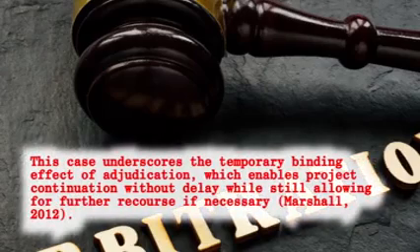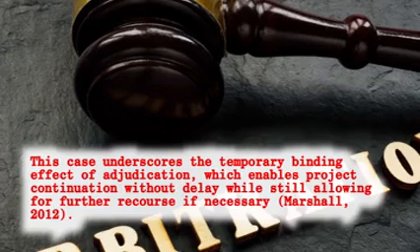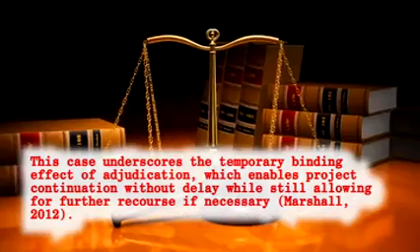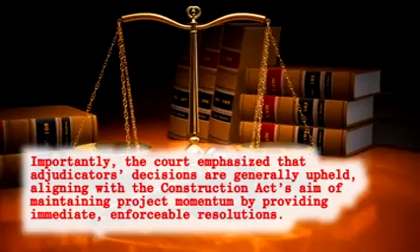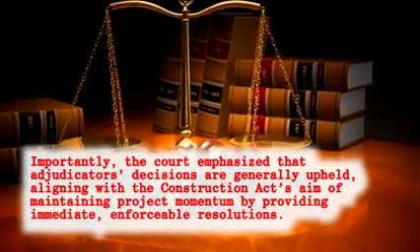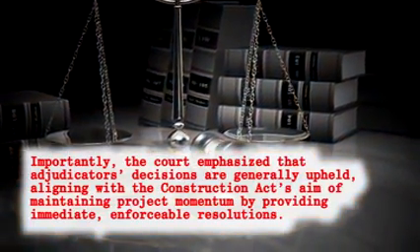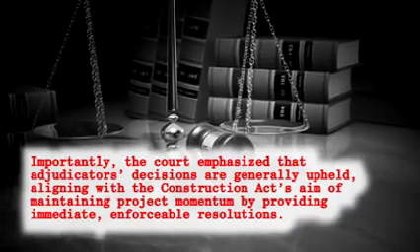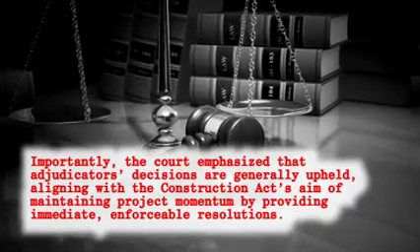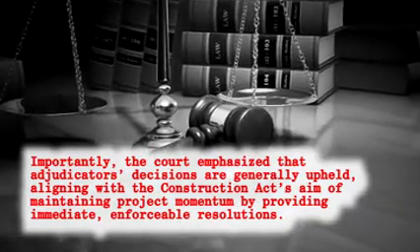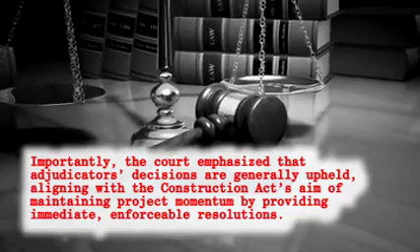This case underscores the temporarily binding effect of adjudication, which enables project continuation without delay while still allowing for further recourse if necessary. Importantly, the court emphasized that adjudicators' decisions are generally upheld, aligning with the Construction Act's aim of maintaining project momentum by providing immediate enforceable resolution.